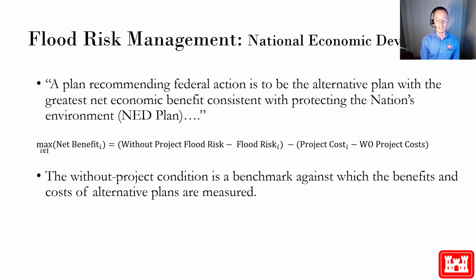this is that by and large, the flood risk management plan that is selected is the one that maximizes net benefits, as the difference in without project flood risk less with project flood risk, and that gets us flood risk reduced or damages reduced, minus the incremental cost.